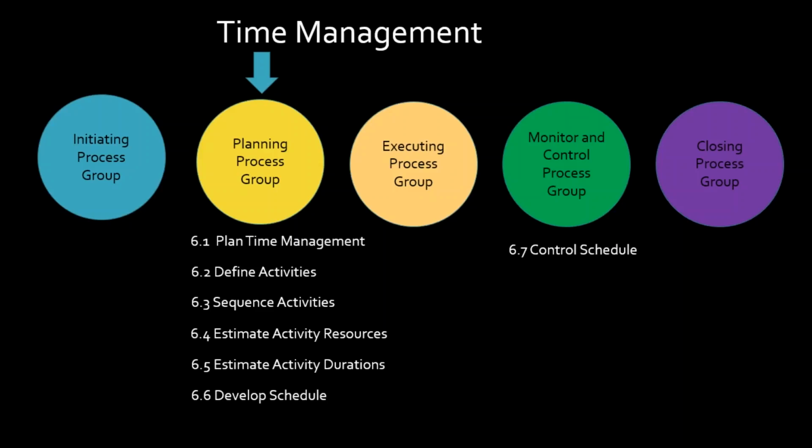Then we're going to identify the work packages under each one of those level 2s that it's going to take to satisfy that level 2 element. As I satisfy each level 2 element, I've satisfied the level 1 element. For the exam, Aubrey, you need to know that level 1 is the entire project itself. Level 2 is the first natural breakdown. Level 3 are the work packages. That's what you're going to get asked on the exam. Okay? Thank you.